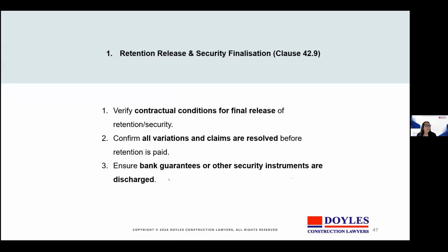So 1, retention release and security finalisation. It's important to verify contractual conditions for final release of retention, confirm all variations and claims are resolved before retention is paid, and ensure all bank guarantees or other security instruments are discharged. It's significant and important that all variations and claims be resolved before the release.